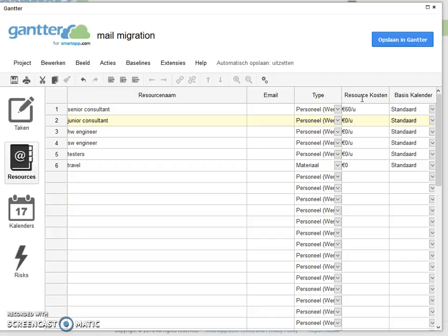But they have a manager. There is a secretary. There is a nice building. There is a restaurant. There are maintenance activities to be done on the building. There is infrastructure in the building. Who will pay for that? Well, that's the reason why you see here 60 euros and not 35. Because we need to pay for all of those overhead costs. So there will be an overhead factor which you will have to add to the salary of your employees to cover for all that.